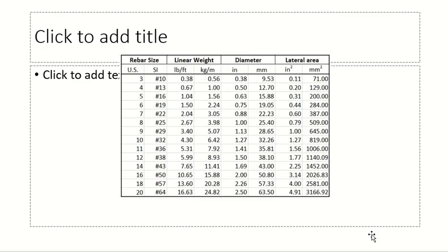This is what we did, right? In the example of the strip, the diameter was 10, and we took 10 millimeters. So it becomes easier, and our life is easy because we will be using the SI units. For your convenience, they have given the area as well. This is like a standard table, you can have it with you. But if you don't have this, you just need the density of steel, like what we did here. Clear?